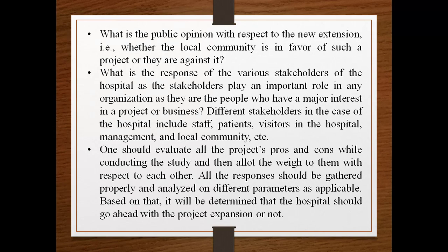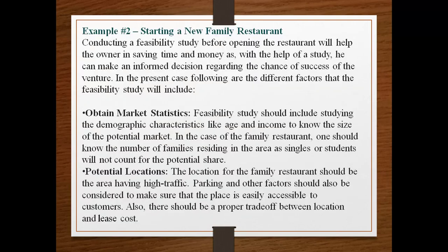One should also evaluate all the project's pros and cons while conducting the study, and then allot weight to them with respect to each other. So you are going to tell the management which feasibility has what weightage. If technical is good, economical is good, operational is good, so everything is good, they will go ahead with the expansion. All the responses should be gathered properly and analyzed on different parameters. Based on that, it will be determined whether the hospital should go ahead with the project or not. So this is how it works in hospital management.